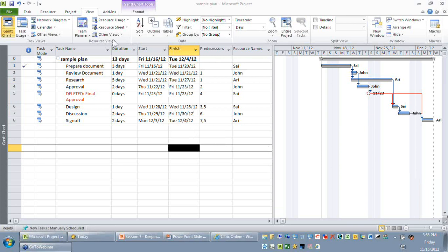So your project will be shown in green, but actually speaking, it is not. Some of the activities which have started initially may have started late, which means those activities are in red. So it's quite difficult to baseline the entire project now.